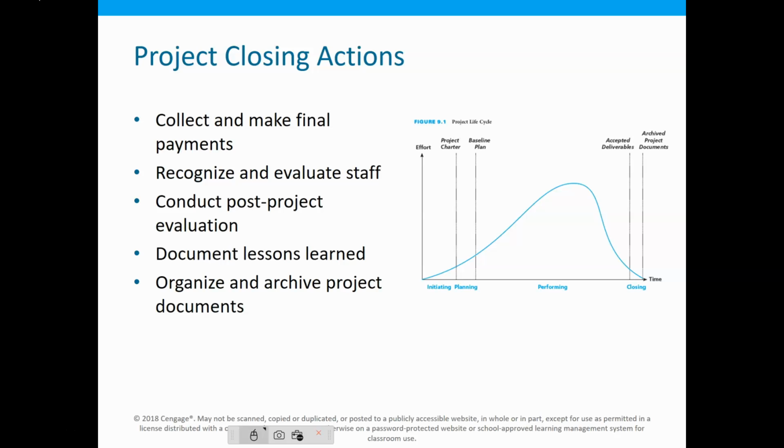And you'll see that often. It does a lot of things. We know that as you're working on this project, you have some inherent biases building up. This allows us to make a clean close. The people working that closing, that's what they do. They're specialists in closing out a project. We can also then assess the records of project manager A, or Lisa, and hopefully she's got everything, and there's a handoff procedure when you do that. It's very, very common for us to do that. So we bring in somebody else to close it out, with the specialties and knowledge to do that.